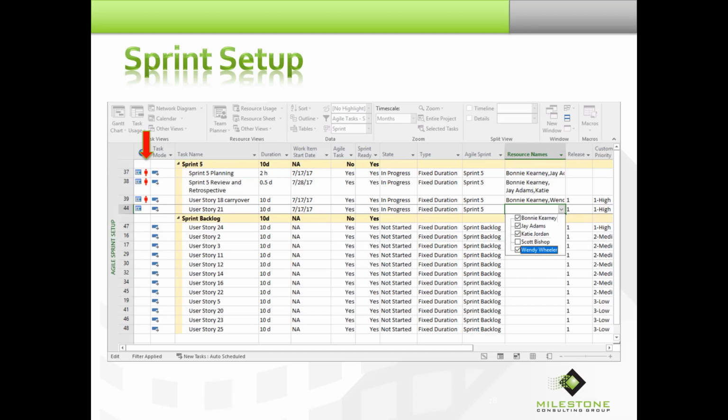For the entire length of the Agile development, these team members are allocated 70% or 80% or whatever percentage it happens to be. And that will help me set expectations with leadership, saying, here is when I have my Agile team booked on this particular project.